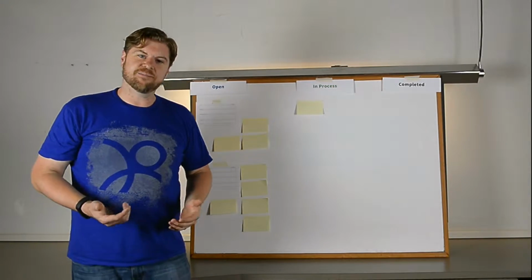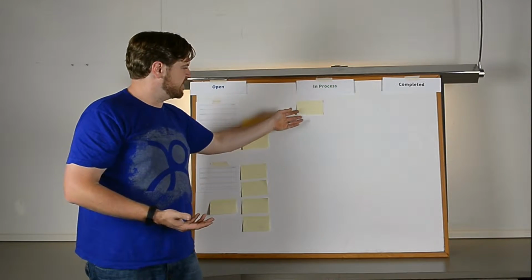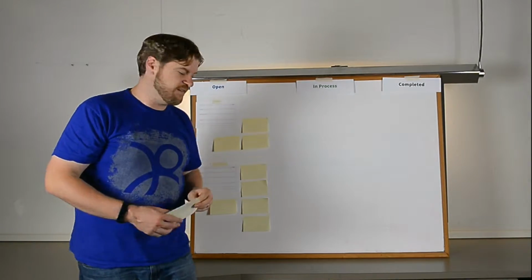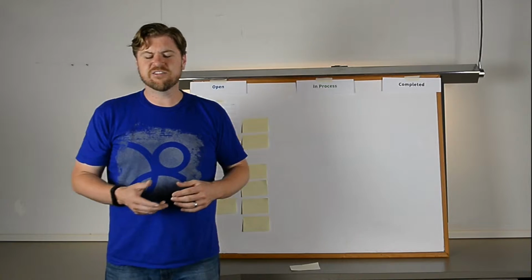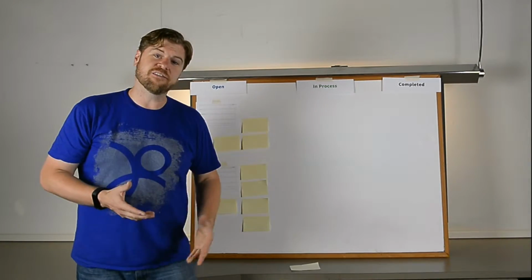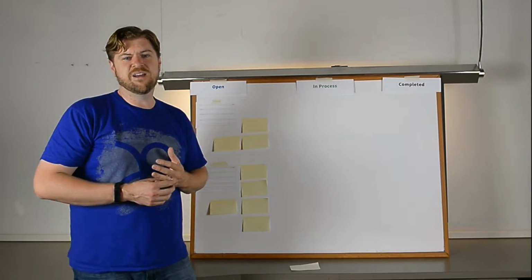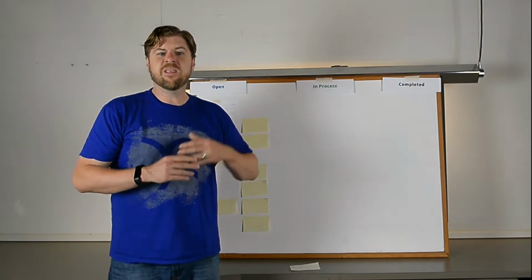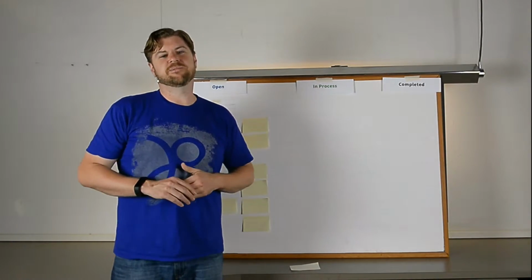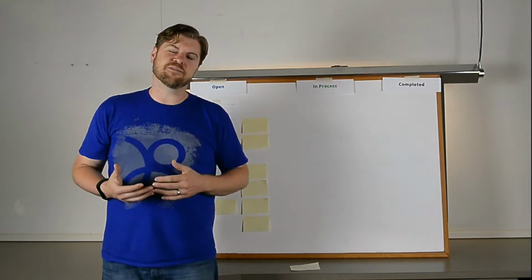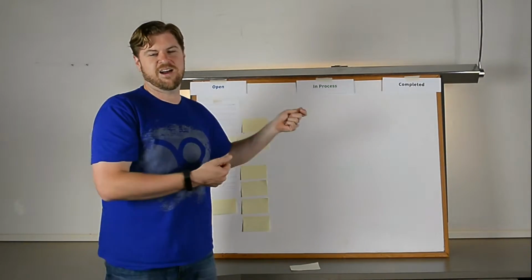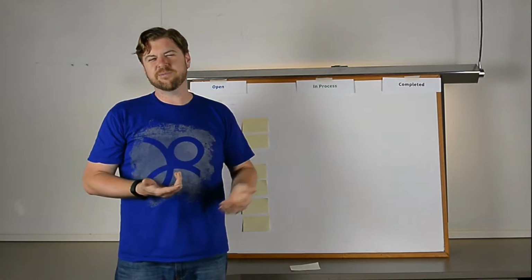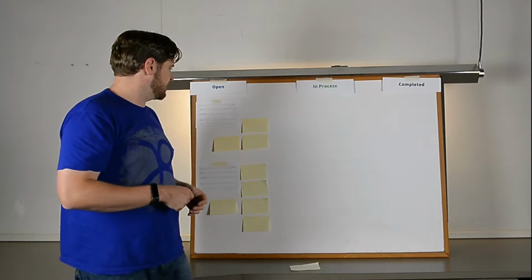Well, sometimes physical boards actually have some issues. And as you can see, this card just fell off. So when moisture's in the air or the cleaning crew comes by, they can actually knock cards off. So that's one of the downfalls of a physical board. The other downfall is real estate. As you get more and more Scrum teams going, you kind of have to have a physical board for each one because it's very hard to pull your cards off daily and put them back up. And so real estate, multiple rooms becomes an issue with your Scrum teams.